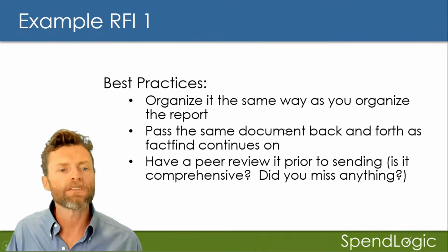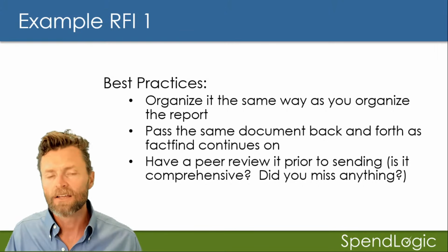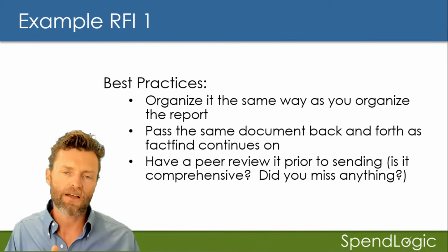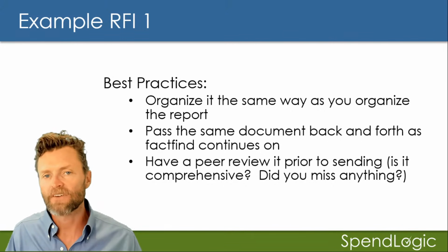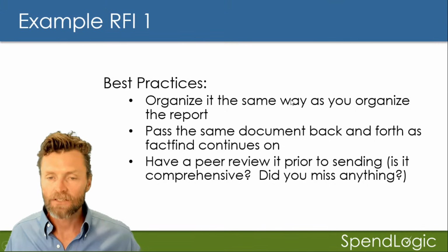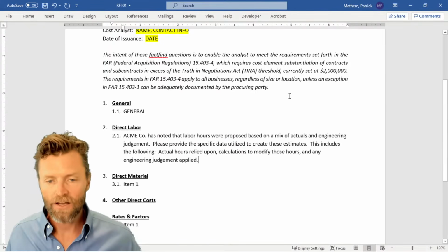Again, some best practices on RFI 1: organize it the same way you do the report, so that as you go through the report, it's easy to identify the questions, and you can go to RFI 1 and fill it in as required. Pass it back and forth as fact find continues on. So don't make it just the initial submittal. You can go back and forth and submit it multiple times.